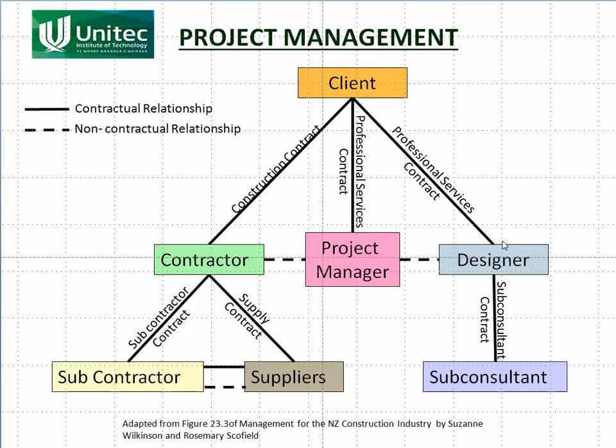Then they'd hire a designer to do the design, to produce the contract documents. Then after that they'd hire a contractor to do the construction, and likewise the designer might hire a sub-consultant, the contractor might hire a subcontractor and suppliers. So the advantage of this is that the client is really only dealing with one person. While there is a contract here, this project manager does most of the legwork, most of the communication with each one of these parties. So the client has very little to do, and he knows that there's one person here who's acting totally within his interest, trying to get the project completed to his satisfaction.